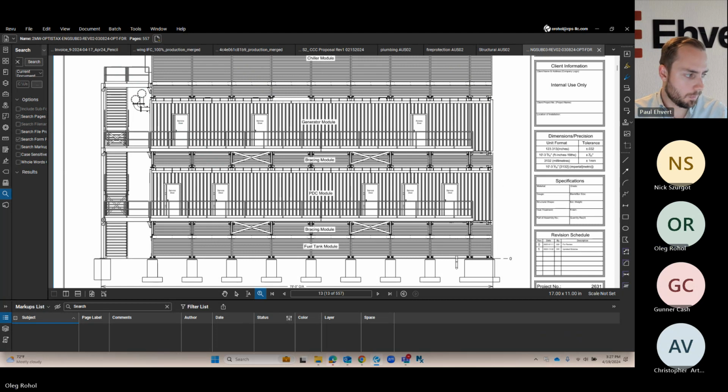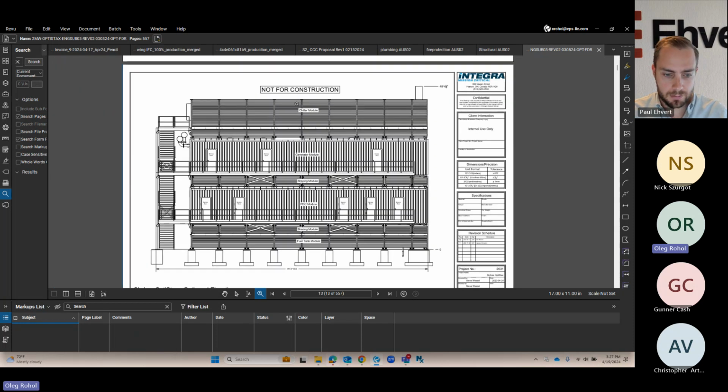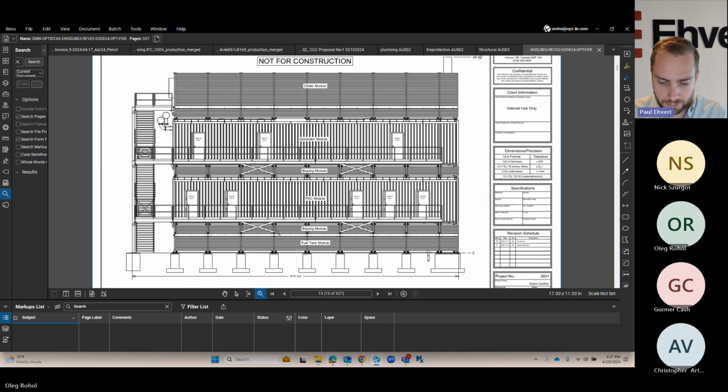By the way, the one day for the platform, that too? No, for that one we're considering two days. So in total, all three OptiStacks, three sets, are supposed to be done in six days per the current schedule. Okay. I think I saw seven currently in the rig set OptiStack. So I was looking at the electrical connections. Yeah, six days.